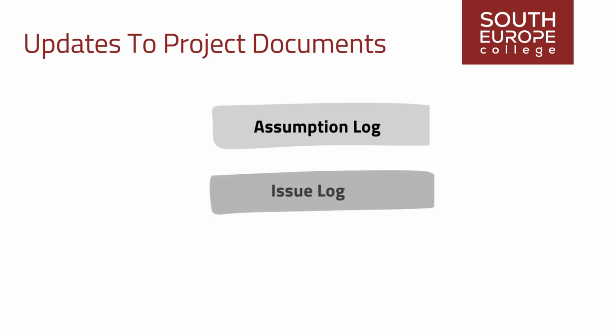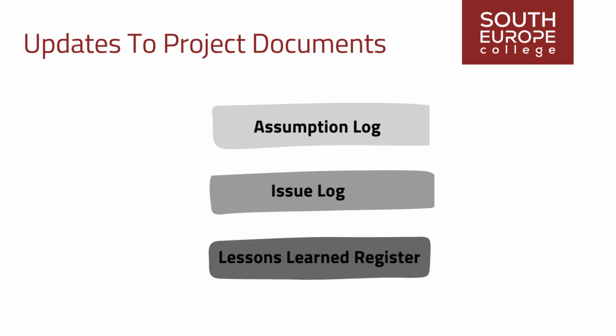Issue log: the issue log is revised to document any newly identified issues or alterations to existing ones brought to light during the risk identification process. Lessons Learned Register: the Lessons Learned Register receives updates, incorporating insights into effective risk identification techniques.